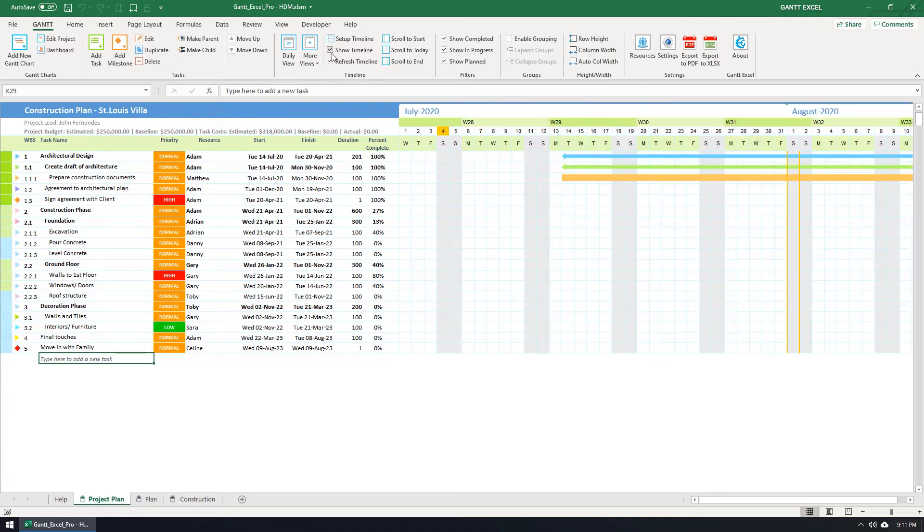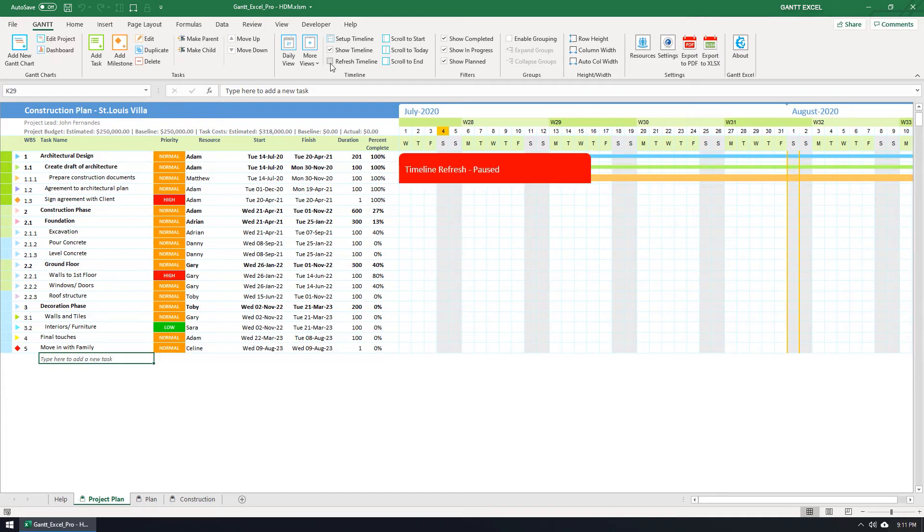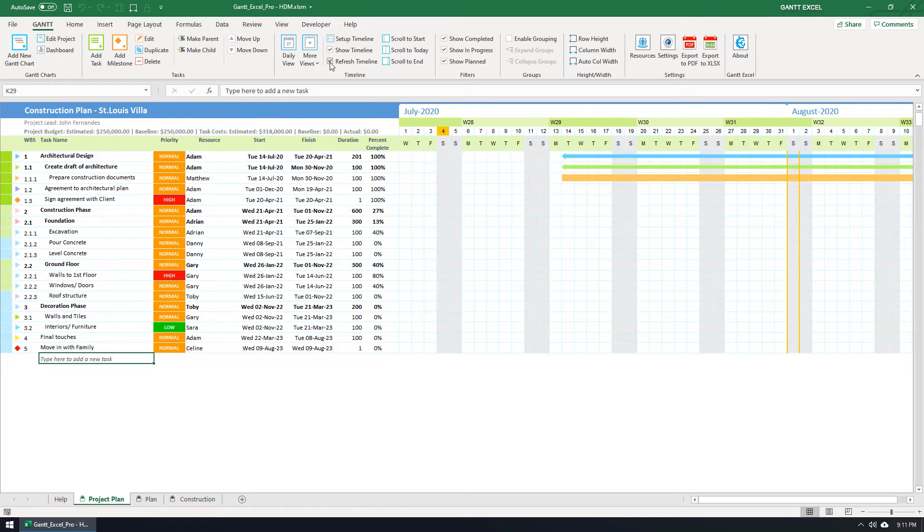You can uncheck the Refresh Timeline checkbox and this will stop or pause the timeline from refreshing. This is very helpful when you have over 1,000 tasks and the timeline takes time to update when you add new tasks. Let me turn this on again.